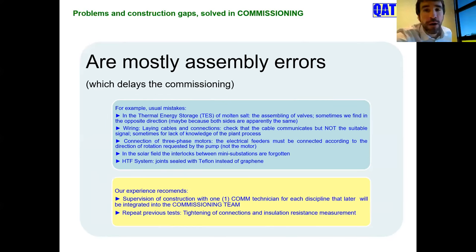So our experience, to finalize, is to put supervision of the construction by very qualified commissioning technicians. Our commissioning team has different levels of experience. I think the construction needs a medium-high level commissioning technician to supervise the construction, at least in the last stage of the construction, and this technician will later be integrated in the commissioning team. And of course, repeat the previous tests.